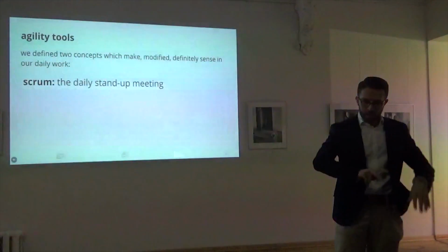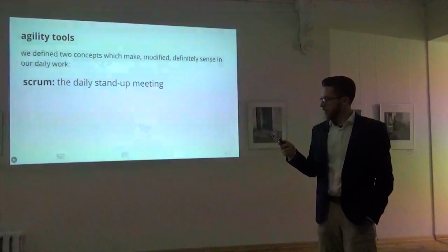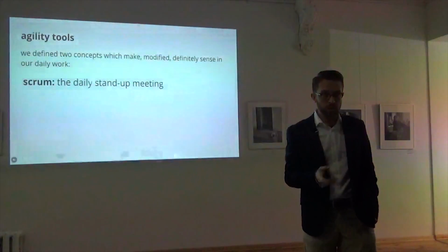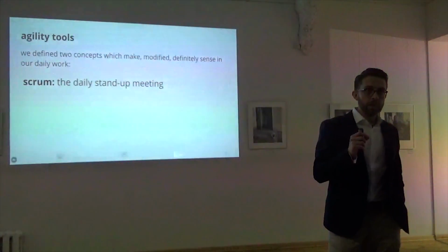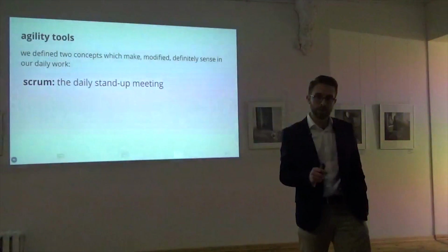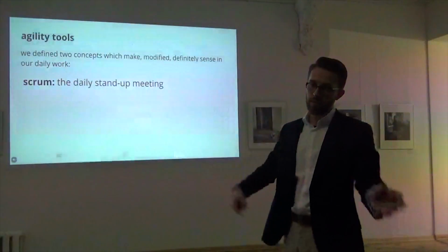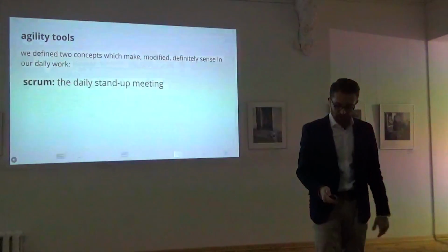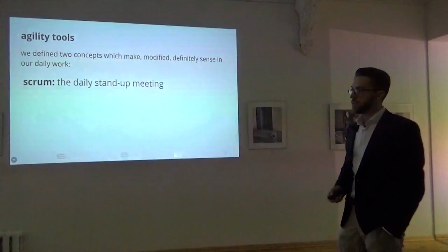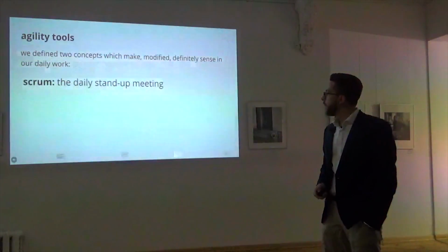For me, there is a huge amount of rules how it should be and how it should not be. For me, the most important rule is it's a stand-up meeting. You should stand. Because if it takes too long and you want to sit, the meeting is too long. That's for me the most important part. So if I start like this on the meeting, I would say, okay, guys, come on, give it a shot. Therefore, stand-up meeting, 10 minutes, good investment every morning at the same time,